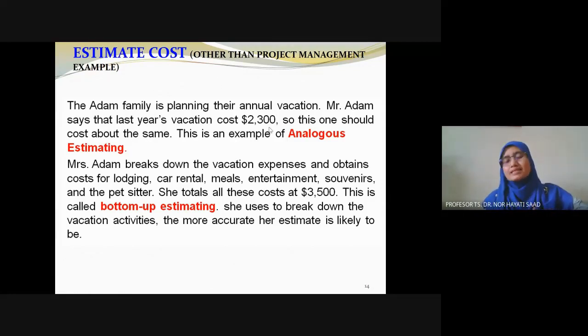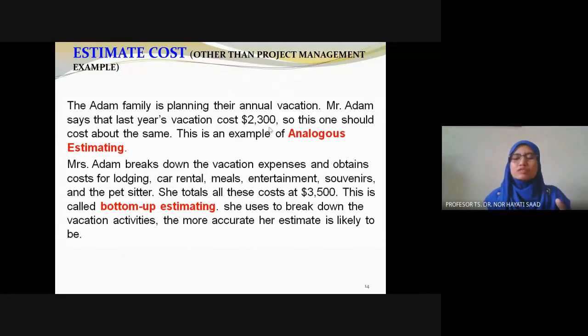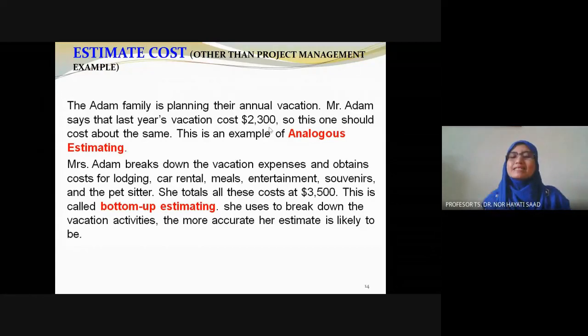But again, the longer the period, the more historical data is normally very high risk, based on my experience, because of the value of money. Let's say the project now is 2020 and you take an example from your previous record, a 2010 project. Over 10 years the value of money is different.